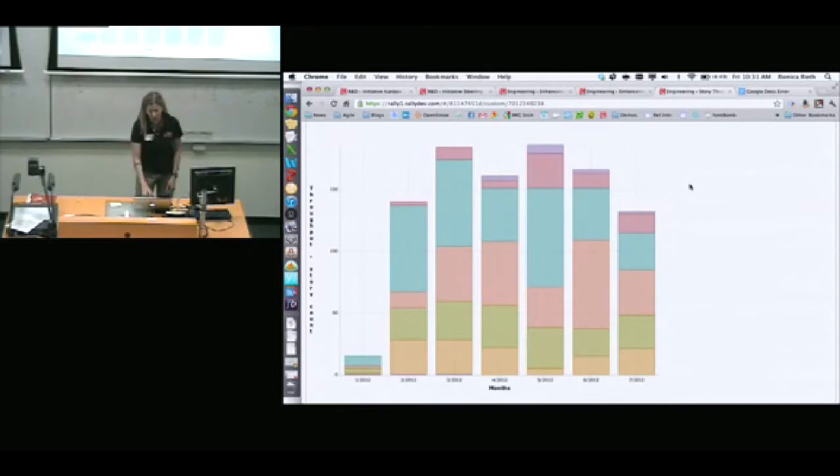So I'll just get to talking about alignment, strategic alignment. This chart shows throughput in terms of number of stories. In case you're worried we're not getting anything done, this one doesn't count because we weren't really tracking at that point. And the colors indicate what sort of investment allocations, right? So we make a decision that says we want to spend, this is architecture, right? So we have a decision that we want to spend 20% of our investment on architecture.